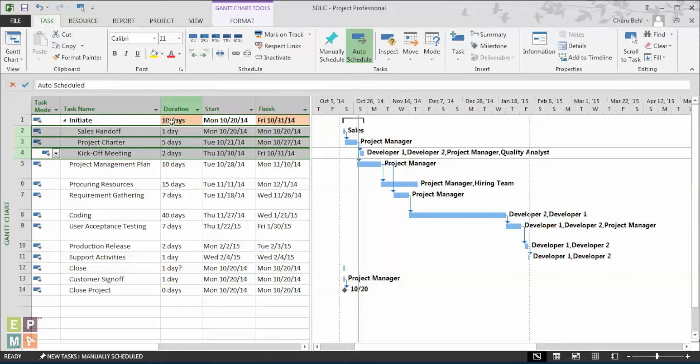Once I do that, you will immediately see the difference. How the sales handoff, project charter, and kick-off meeting become the sub-tasks and the initiate task becomes a summary task.